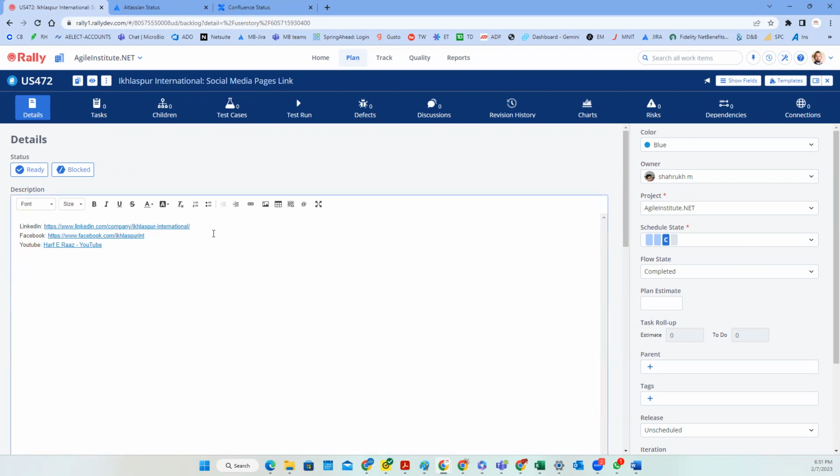And if you feel that it is not one functionality but in fact multiple functionalities, then you split that user story into two, with the consent of the product owner, when you feel it is too big a feature. For example, you are asking for social media but also something else, so we keep social media in one story and the something else in another.